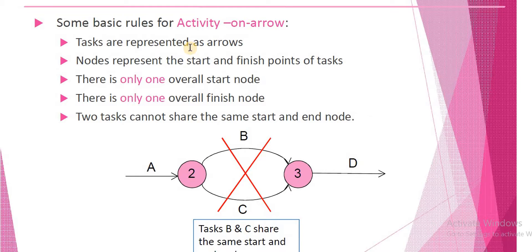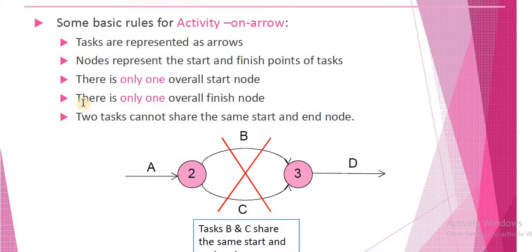The basic rules for activity on arrow diagrams are: tasks are represented as arrows. In the activity on arrow diagram, we use arrows to represent activities. There is only one overall start node and there is only one overall finish node. A very important characteristic is that two tasks cannot share the same start and end node.